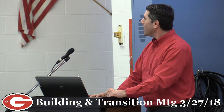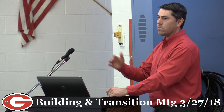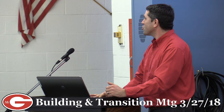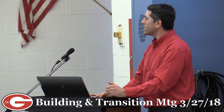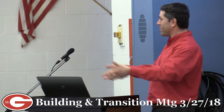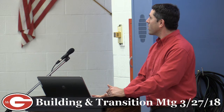That's on track for the building as a whole to be up and running at the end of May, a little bit into June. So that fits into when the district is going to start moving stuff into the new building. The driver for occupancy is the last area to be done, and FF&E is a driver too. We can do preliminary inspections leading up to this, and we've had some discussions with the town in that regard, as areas start to free up, to make efficient use of everyone's time. Instead of saying the whole building's ready, come walk through 80,000 square feet, we'll chunk it out a little bit at a time. But then they'll do their final once all the owner FF&E is in place.